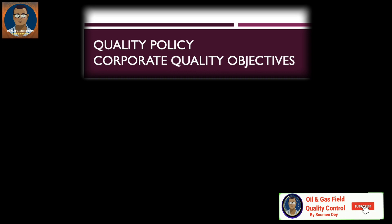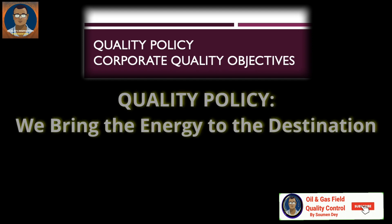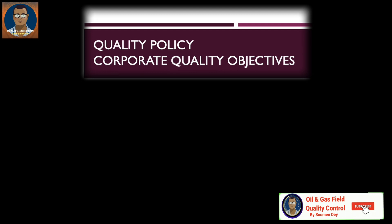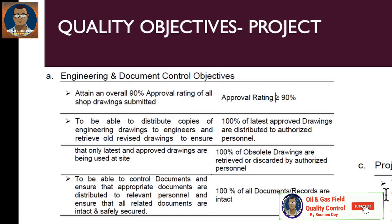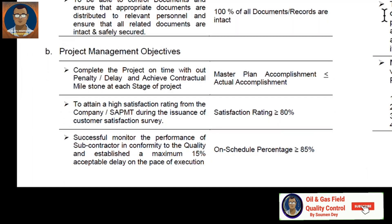Quality policy and quality objectives are a little bit different. Quality policy is a general policy for the organization which they apply to their business overall. Here is an example of a quality policy: 'We bring the energy to the destination.' Now, quality objectives of a project are generally measurable, mentioned with some percentage. For example, the engineering and document control department can have an objective of overall 90% approval rating for all shop drawings. Project management can have an objective to complete the project on time without penalty or delay and achieve contractual milestones on schedule at each stage.